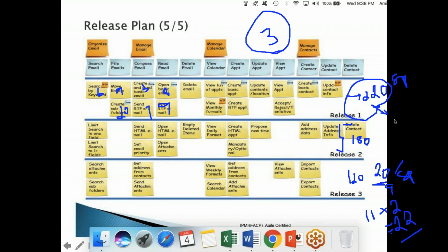How do you manage the backlog in a sprint? Same thing at a sprint level: whatever user stories you have agreed go into the sprint backlog, right? And during the sprint or iteration, you are not allowed to change the user stories. That's how they manage. I hope I answered your question.